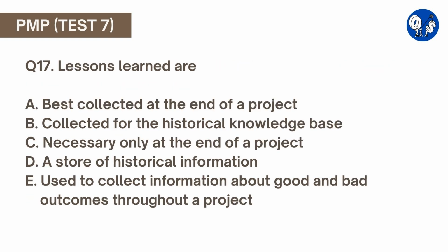Question number 17. Lessons learned are A. Best collected at the end of a project, B. Collected for the historical knowledge base, C. Necessary only at the end of a project, D. A store of historical information, E. Used to collect information about good and bad outcomes throughout a project. Here option E is correct.